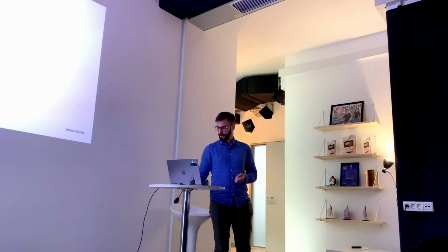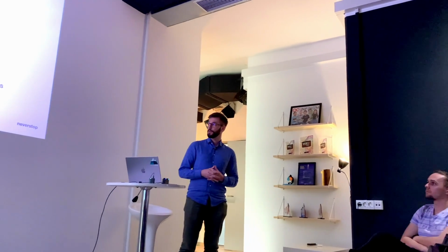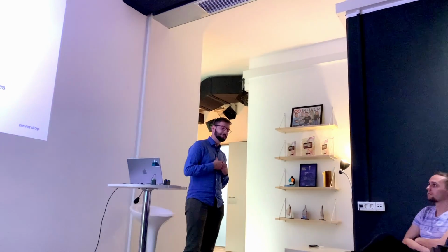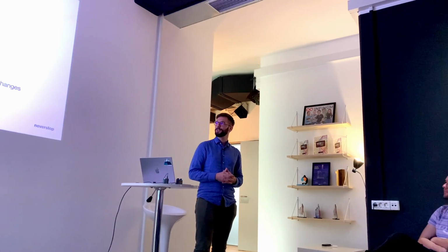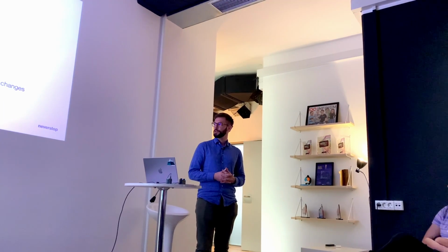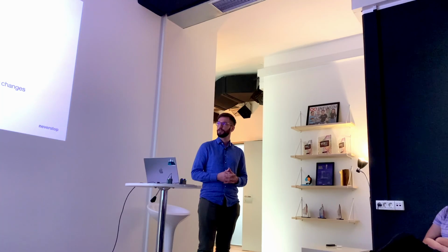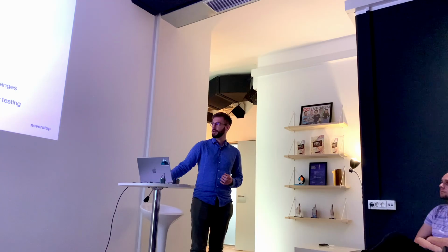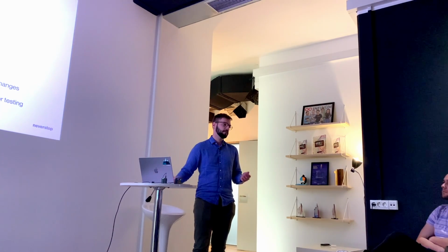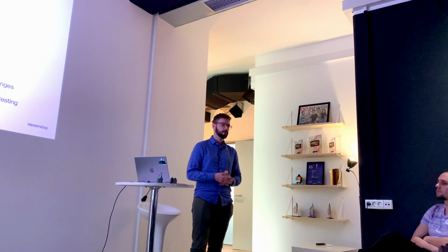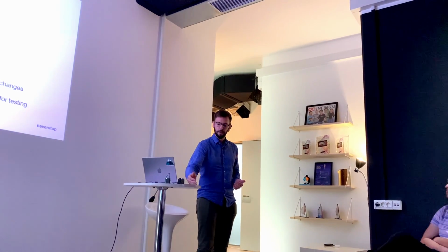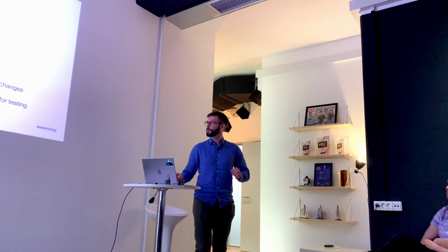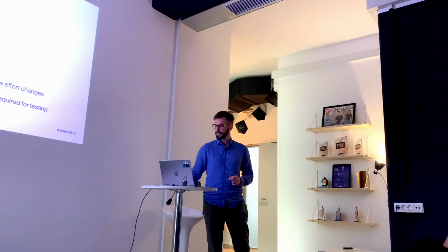Okay. So yeah, I would say that this works well for low effort changes, and I would just like to say that from a developer perspective, it's not always necessary to ask the project manager for a certain thing, especially if it won't impact your delivery on a certain feature. And also you should include the time required for testing, so keep in mind that someone needs to test that. So if you have a budget or something planned out, try to see if it can fit into that. If not, I wouldn't put it in.